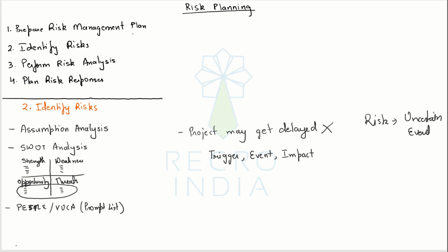Say for example, the same thing, but now I'm going to describe it as: due to festival season, workers may go on extended leaves, leading to delays.